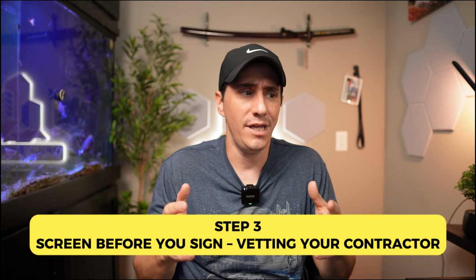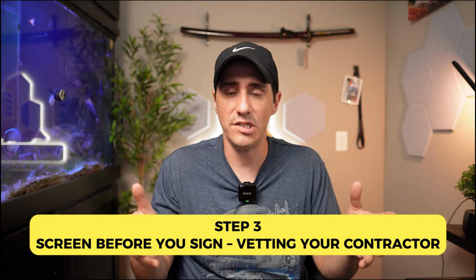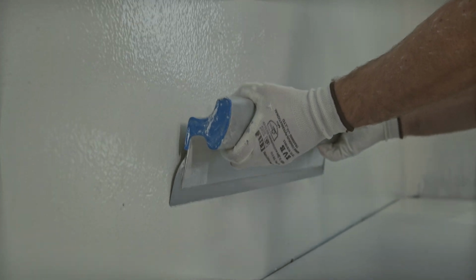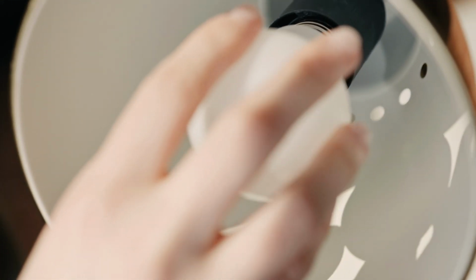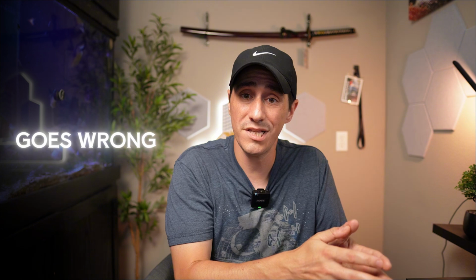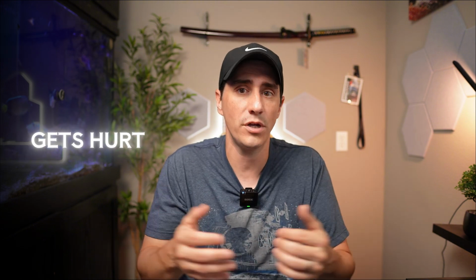Which leads me into step 3. How do you actually screen and vet these contractors the right way? There are several questions that you want to ask before you hire them. Number 1, biggest question, are you licensed and are you insured? While yes, sometimes that doesn't matter if they're just doing some simple touch-up painting or installing some light bulbs, if you're doing a full gut job or a lot of flooring or plumbing work and they're not licensed or insured, you could be on the hook if something breaks, goes wrong with the tenant, or if that person gets hurt working at your house.